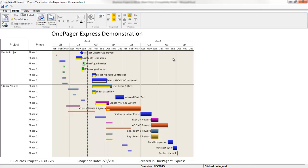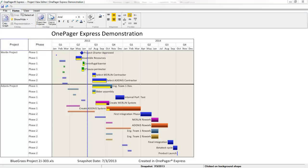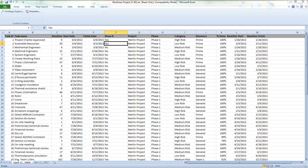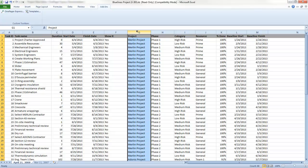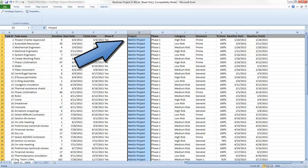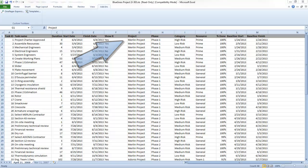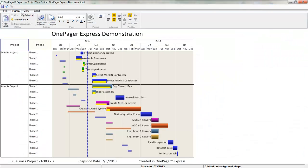The second and third main dimensions of automated organization are the swim lanes and rows columns, which are these columns of data here on the left. OnePager can group your tasks into fat swim lanes for you, again, based on existing data in your plan. In my example, I've used the project names, which were populated in the project column within my Excel document.